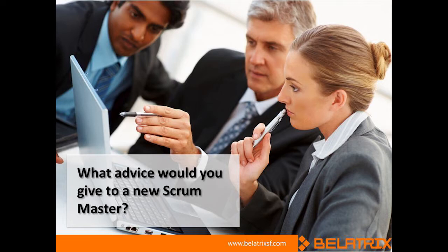If you really want the team to understand the Scrum world, the Agile world, you need to give them time to digest it in the real world. The best time box I've seen is actually 3 weeks. It gives the team time to plan accordingly, build up a cadence, and deliver successfully each time.